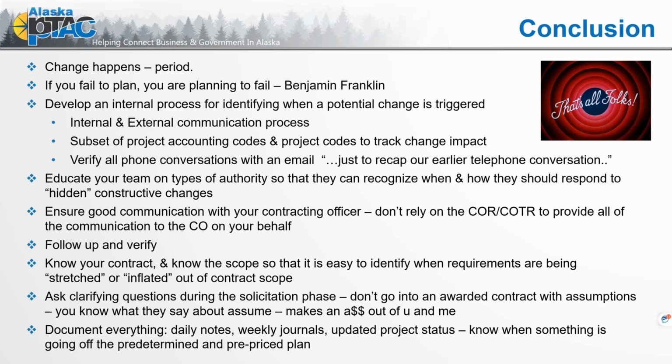Because often, especially if there's a long delay in requesting those changes, the further away from contract completion we request those additional funds, those REAs, the harder it is to substantiate them and have them come through as agreed and paid.